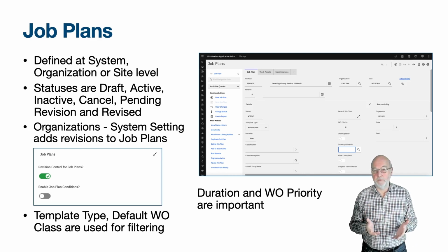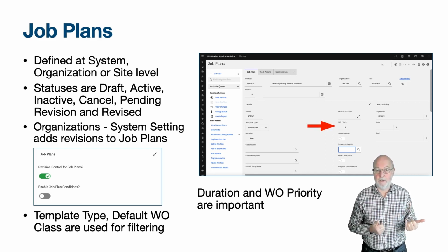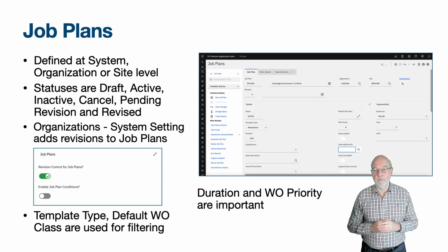The work order priority is a value between 0 and 999, where 999 is the highest. You may restrict this to a smaller number of values by configuring a domain on the field. 1 to 9 is an adequate range for most Maximo organisations. Understanding the relative importance of work helps in making decisions on which work orders to prioritise when resources are short.